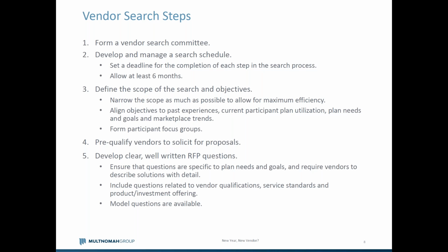Once the search objectives and the scope have been defined, the next step is pre-qualifying the vendors that you're going to solicit proposals from. Again, I don't think in most cases you want to solicit proposals from everybody in the marketplace. That's a lot of proposals. So try to find, either by working with a consultant partner or just internally with the folks tasked with this, the best set of vendors to send this to, and put together a list so that you can be sure to solicit proposals from those vendors when you distribute the RFP.